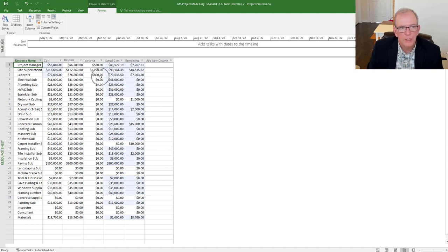So I must have assigned 1 laborer to the entire project, and that laborer is making $400 a day, they're working 2 days, and so that's why that $800. The reason project manager isn't as much is because I've assigned the project manager 50% to this project. They're there half the time. So 2 days would count as 1 day, as an example.